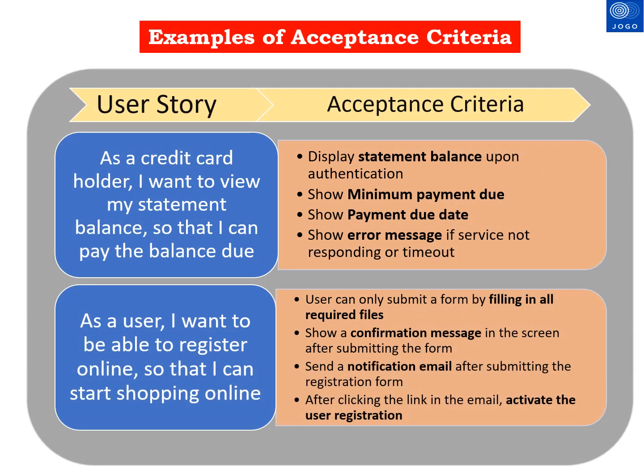You can see two examples of user stories along with acceptance criteria. The left side items in the table are user stories and the right side items are acceptance criteria. The first user story is: 'As a credit card holder, I want to view my statement balance so that I can pay the balance due.' There are four acceptance criteria: display statement balance upon authentication, show minimum payment due, show payment due date, and show error message if service is not responding or timeout.